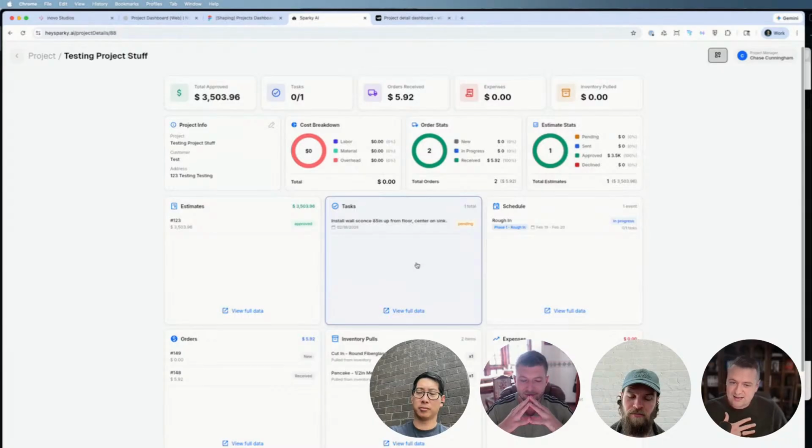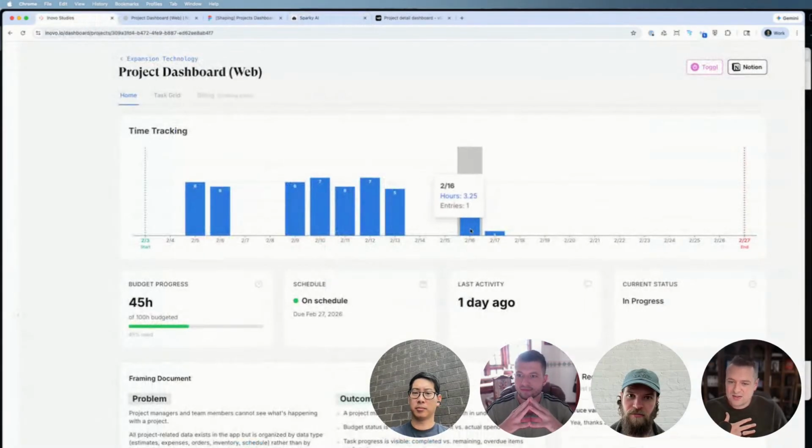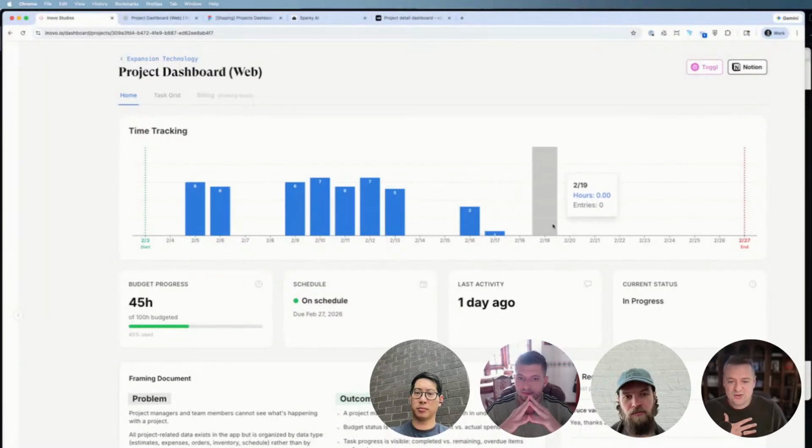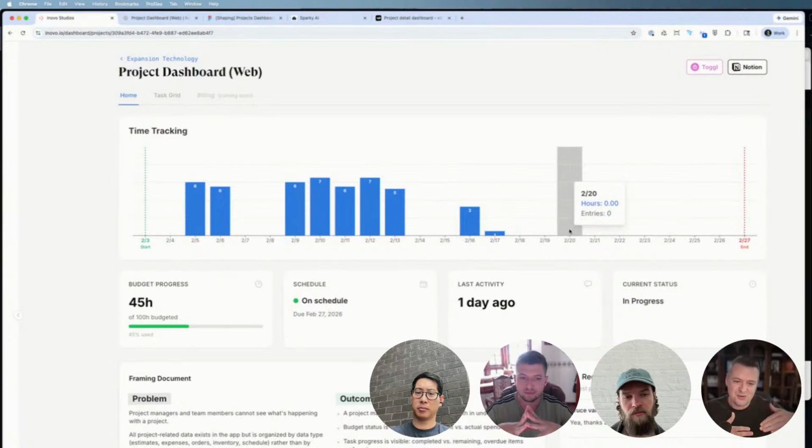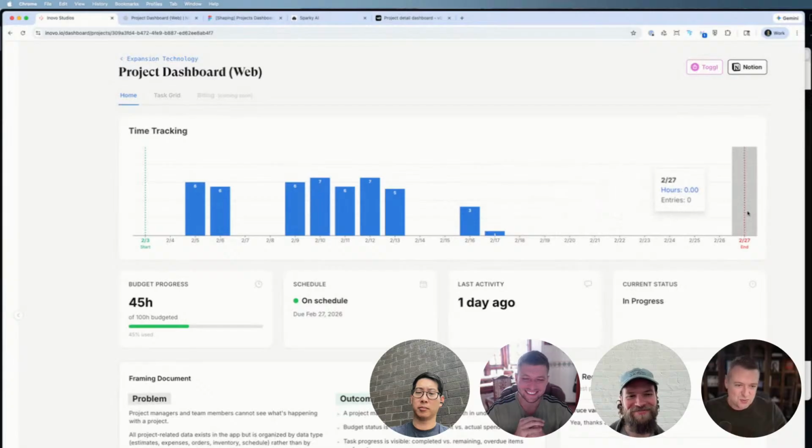So we showed it to the client here in the timeline. We showed them on the 16th, I believe, or the 17th, I think is the Tuesday. Demoed it. They reviewed it for 2 days, and they sent us a whole list of items that they noticed that either were bugs or things being presented as a bug, but they're kind of a small feature. We know what those look like. And again, with the margin, we have 2 full weeks to go and make this look really great.